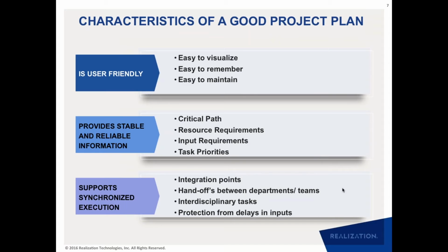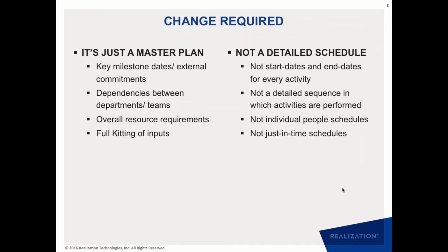And then there are sub-bullets that you can read on the screen, which are pretty obvious, so I will not go through those. What I instead want to do is get into what change is required in our thinking about a project plan that will allow us to actually create good project plans. The trap that we have to get out of is treating the project plan as a detailed schedule. Instead, we have to treat it as a master plan, only a master plan.